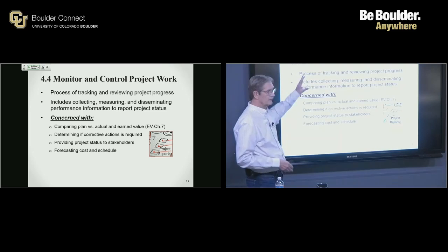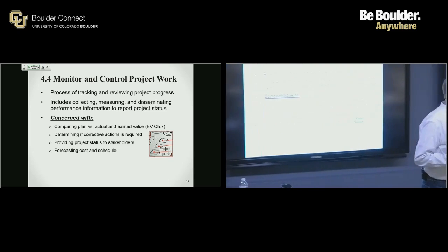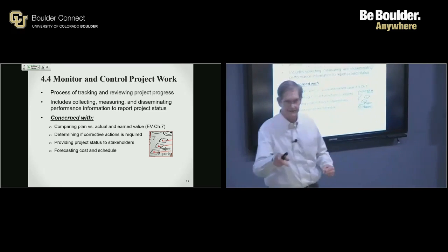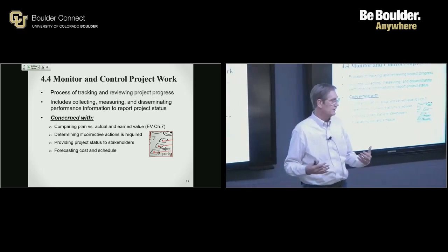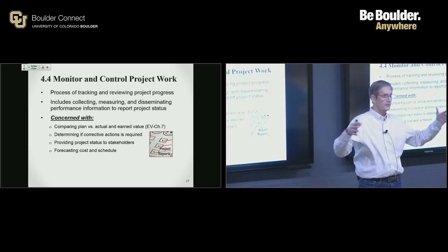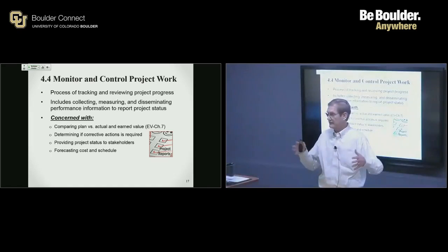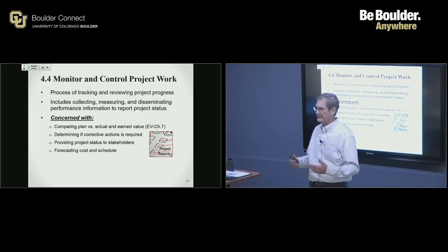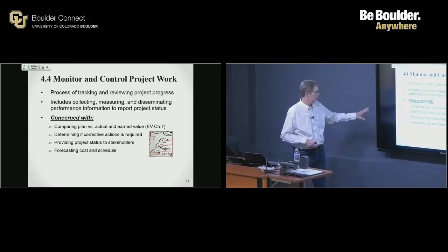But typically, when you're monitoring and controlling, is this something we do at the beginning, middle, or end of the project? Middle. Say again? Throughout. Good job, Alex. So monitoring and control is something we do throughout the project life cycle, not just at the beginning or middle or end. You're constantly monitoring, even if you're initiating the project or executing the work, you're constantly monitoring and controlling on the way. So you're comparing